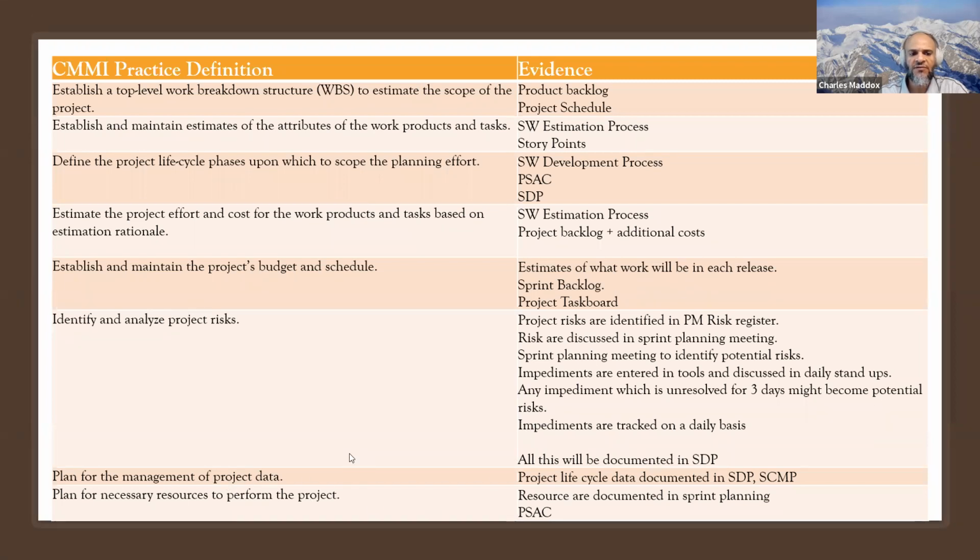And you left off at plan for management of project data, and so project lifecycle data is documented. That's documented in your software development plan and your software configuration plan, as well as on the last bullet point there, the CMMI practice that's requiring you to plan for necessary resources to perform on the project. That'd be captured in your PSAC.